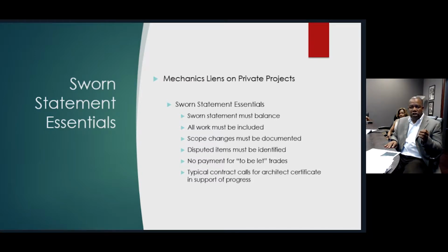Your record should include all the details that would possibly be used in a lawsuit at the end of a project. I'm not wishing that upon you, but I want you to be prepared in the event of suit. Again, the disputed items should also be included on those sworn statements. And no payment will be provided for those items that are to be let trades.